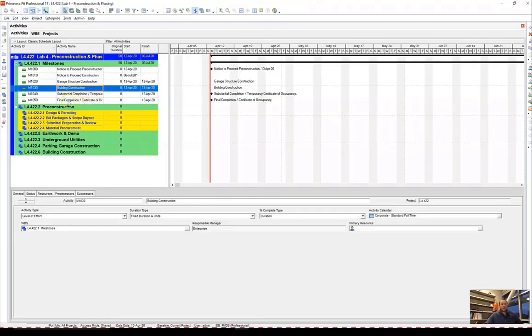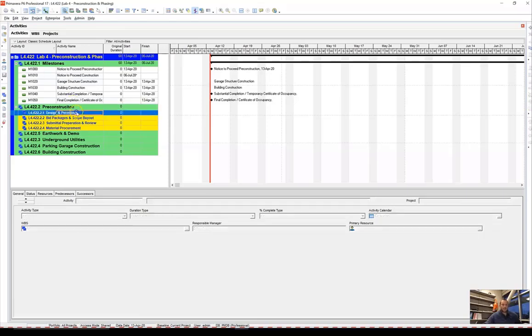When it's done, right here, all of the agencies have signed off: PG&E, electric, water, sewer and gas, all that stuff. And then you get the certificate of occupancy from the city and a final completion notice from the architect, just stating you've completed your work per contract, and this kicks off retention. Not necessarily important, but that's just kind of the big difference between the two.